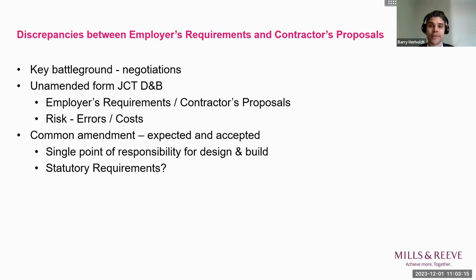And to fix the error, this will be treated as a change under the contract, meaning the contractor can become entitled to cost and time. If the error is in the contractor's proposals, the risk sits with the contractor, who is responsible to fix the error at its own cost. But employers generally prefer to protect their own commercial interests as best as possible.